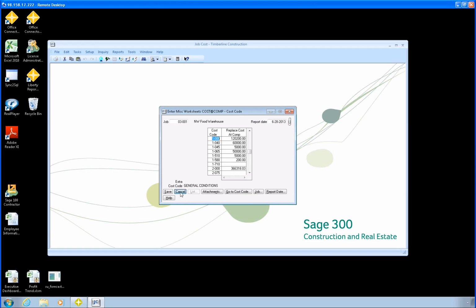And the time that it would take sometimes to turn that whole process around would be a few days, even a week. In that amount of time, some of these values would have changed, like the job to date cost, and things of that nature. So now the outcome of the analysis is no longer really current. It's no longer valid. So what they were looking for was a way to make this something that project managers would easily adopt, that would be efficient and timely, so that they would get results right away that they could actually use to manage their jobs.